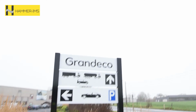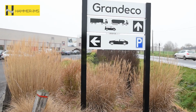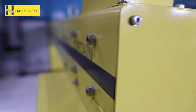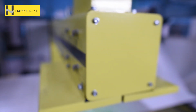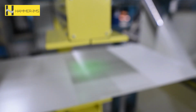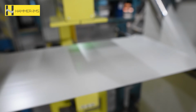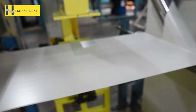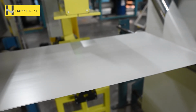The commissioning of the machine at Grandeco Wall Fashion Group took place in 2 phases. Initially, the tests focused on executing basis weight measurements and evaluating the results. After successfully completing these tests, the machine was operated in fully automatic mode, including the coding step controlled by the closed feedback loop. Every aspect involved was analyzed in detail to ensure accurate and reliable system operation.